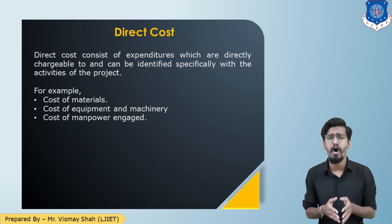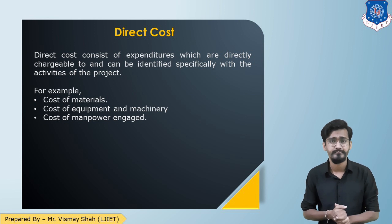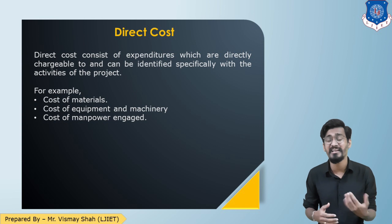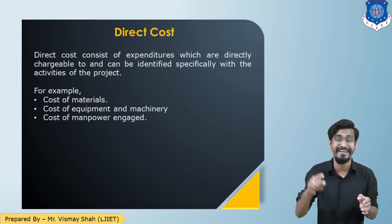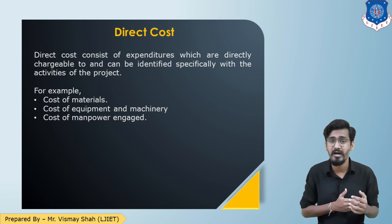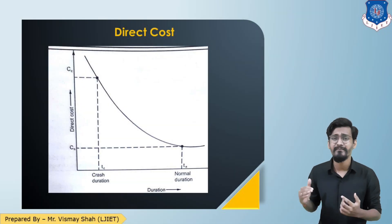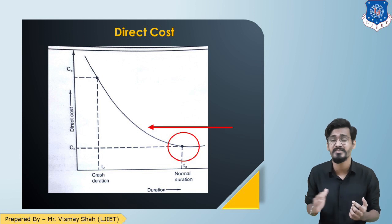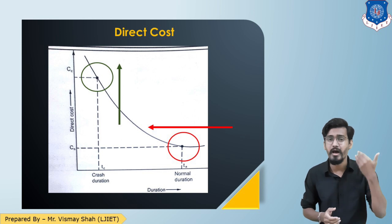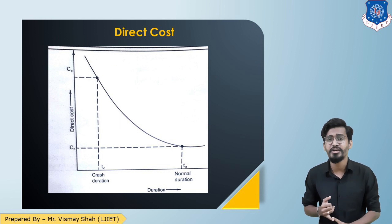Normally a project has an optimum duration in which it can be completed with optimal usage of resources, and that is known as the normal duration of the project. As we deploy additional resources, the direct cost will increase. Looking at the graph, as we increase resources and reduce the time, the graph goes backward and upward. This indicates four terminologies: normal duration, crash duration, normal cost, and crash cost.